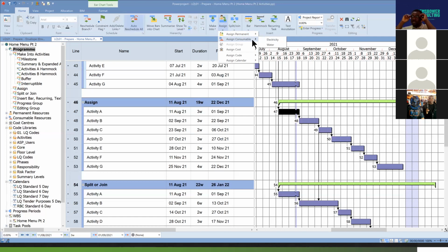When you create a resource like that, you can put it under a group, okay? So when you create a group resource, what you are doing is combining both permanent and consumable resources under one single resource, which is perhaps a very good way to not duplicate resources, but like I said, we will not be going into all of those details.